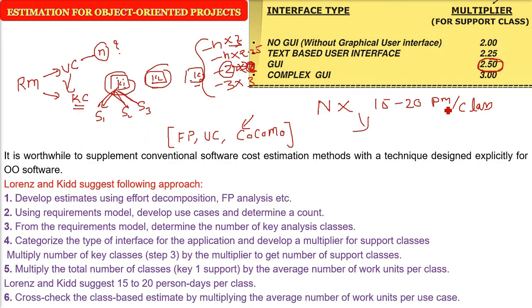You can cross-check the class-based estimate by multiplying the average number of work units per use case. This is a straightforward method to estimate object-oriented projects, based fundamentally on determining the number of classes.